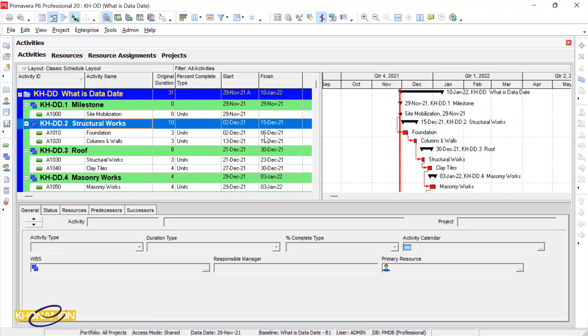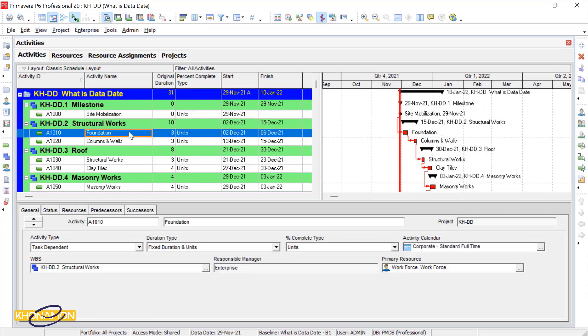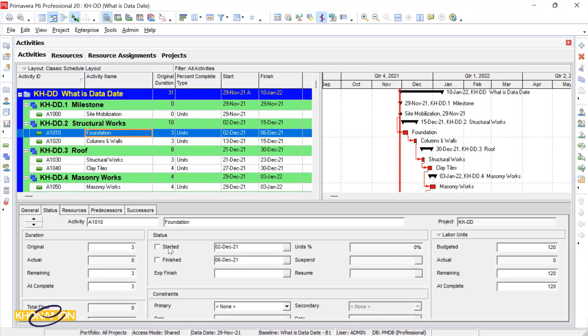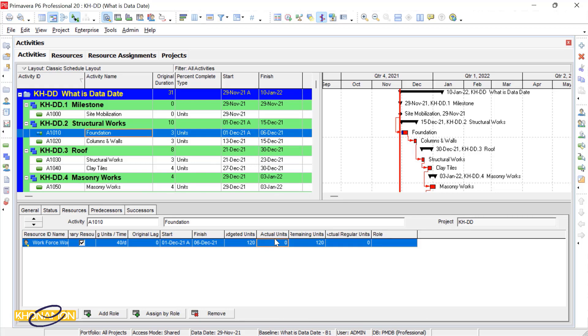Then you input them into P6. You gather the updates, you have the data date, and you insert them into P6.